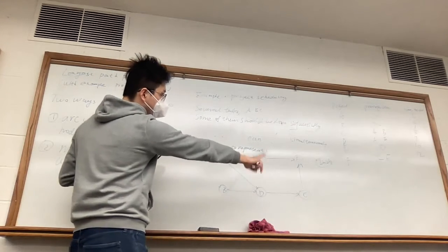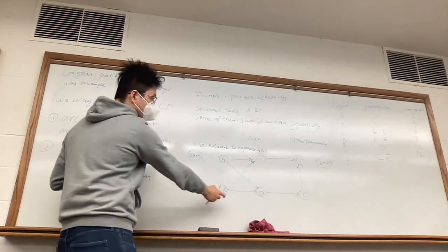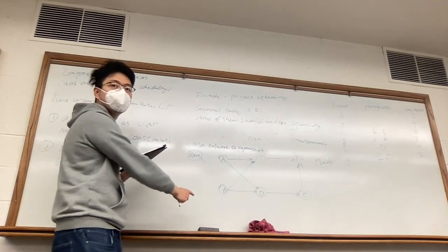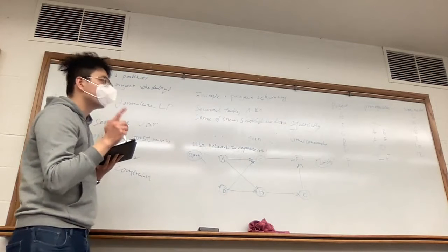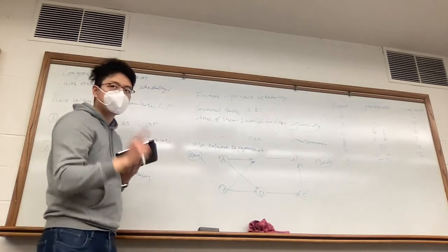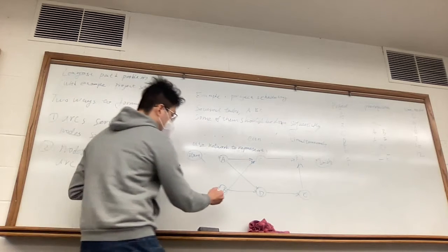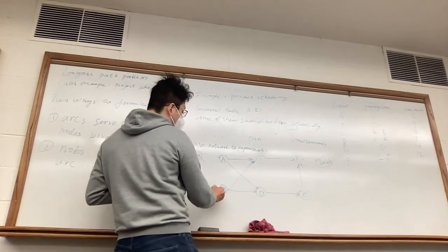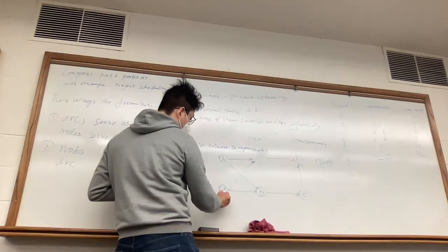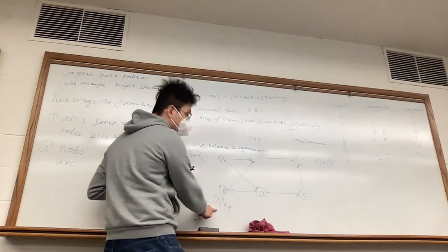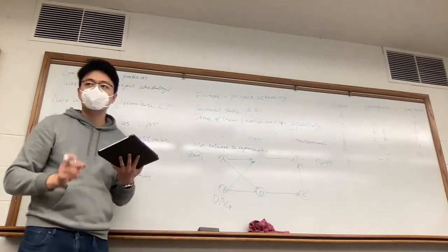Just look at A, B, C, D, E, F. What's the property of this directed graph? Let me give you some hint. Does it have a cycle? No. So actually, in project scheduling, we are dealing with something called a DAG, directed acyclic graph. Acyclic means that there's no cycle.